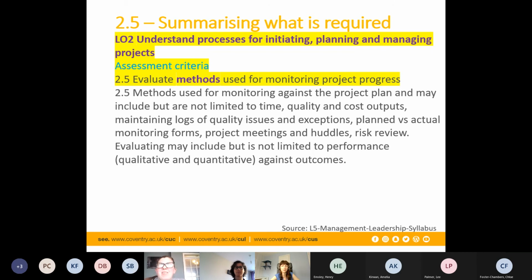I think Highways England's cap is 85%, so if you're under 85%, you have to have a remedial action plan for how you're going to get back over. It's very tight. We work to a 12-week and a 4-week. The 12-week look ahead is spoken about monthly. The 4-week is very similar to Henry's, the Friday and then the Monday, and it hones people's minds. Then on the Tuesday the programme's updated, in an ideal world. It doesn't always happen.